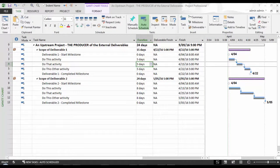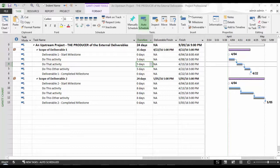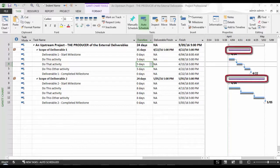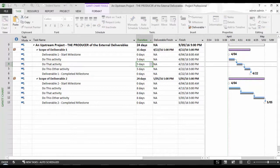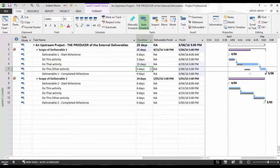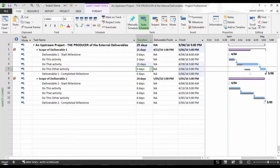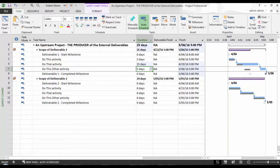I have saved and closed my Downstream project, and I have returned to my Upstream project to simulate a change in the duration like we did earlier with the external dependencies. Notice here that I have formatted the Gantt bars to display the deliverable. I have modified the default pattern so that it's more apparent and visible on the screen. The purple represents my Deliverable start and finish. I will go ahead now and change the duration of my task affecting Deliverable 1 from 5 days to 15 days, just like before. Notice that the duration of the Deliverable did not change. This is what I want. As I said before, only if I have the formal approvers to make the change should I go ahead and update the finish for my Deliverable.